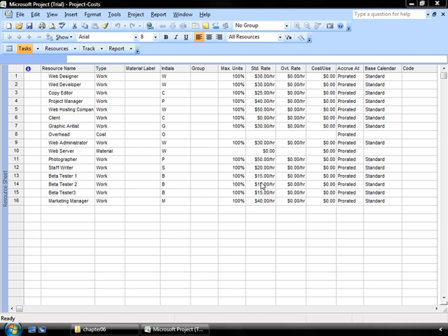If you assign a rate per hour or per use for each resource that you have in your project, it will use those values to calculate your overall costs. The calculation is a mathematical formula, which is the resource cost times the amount of time or duration you use that particular resource ends up creating your task cost. So it's fairly straightforward. The cost times the duration of the resource used gives you your overall cost.